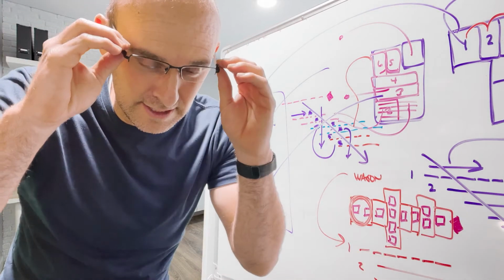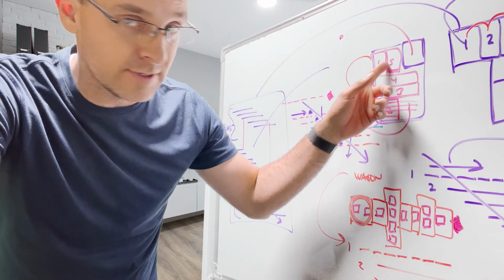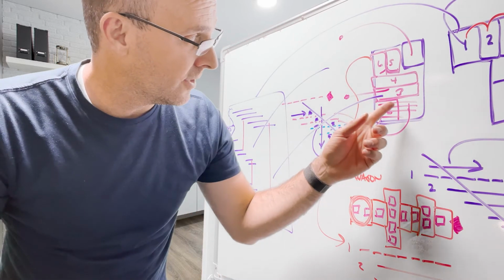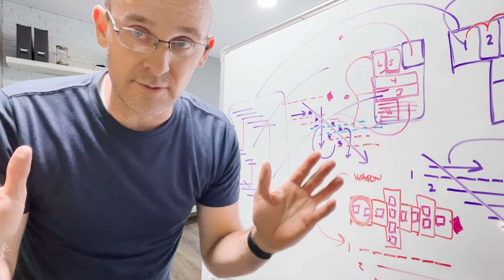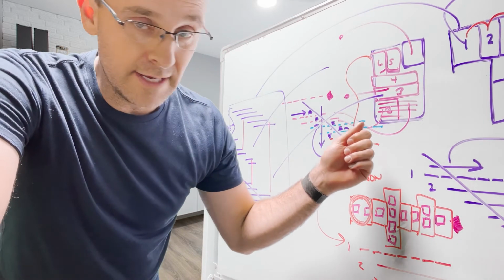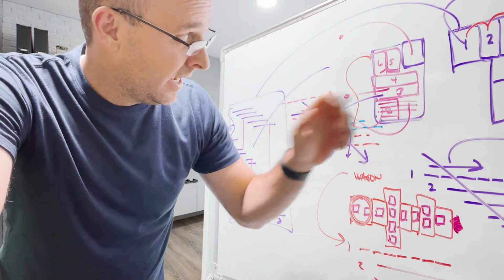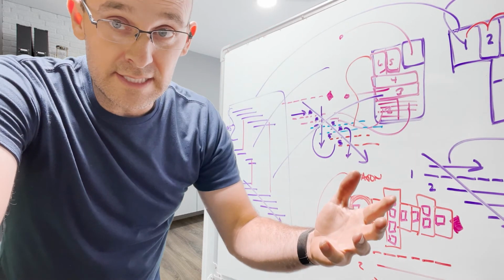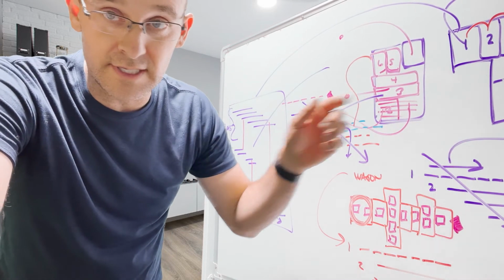See, everything about lean assumes that we're reducing work in process, which means we finish areas as we go in smaller areas as we go, one piece flow. So if we pull plan this whole area and you're doing all of the flooring at once and all the ceiling at once, that's increasing work in process, and we don't want to do that. So remember that. But if you do want to just handle this with just last planner and have these be in takt, let the people running these do it in takt. Their capacity will increase because their load will reduce, so you can focus here.